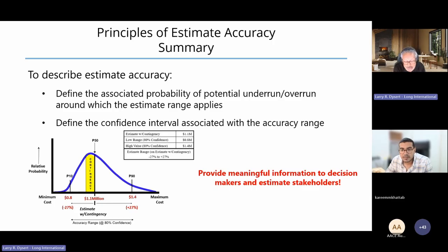Now with a parametric methodology, the methodology itself is fairly easy. It's very quick to do, typically. All the work, though, has to be done ahead of time. We need to be able to create a parametric model. We need to collect data around cost growth in comparison to project characteristics. Using that data, we can generate algorithms that try to correlate characteristics to cost growth, or characteristics to contingency values.